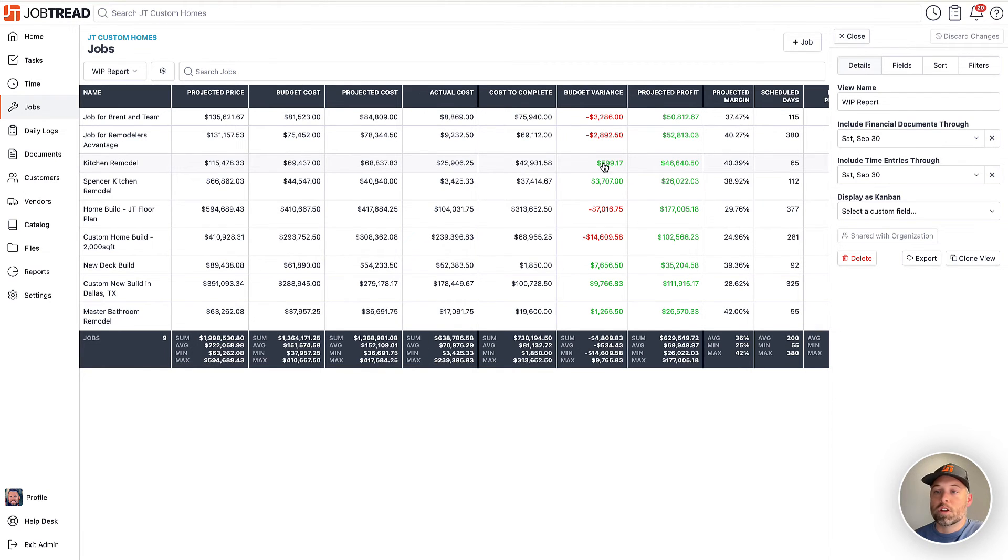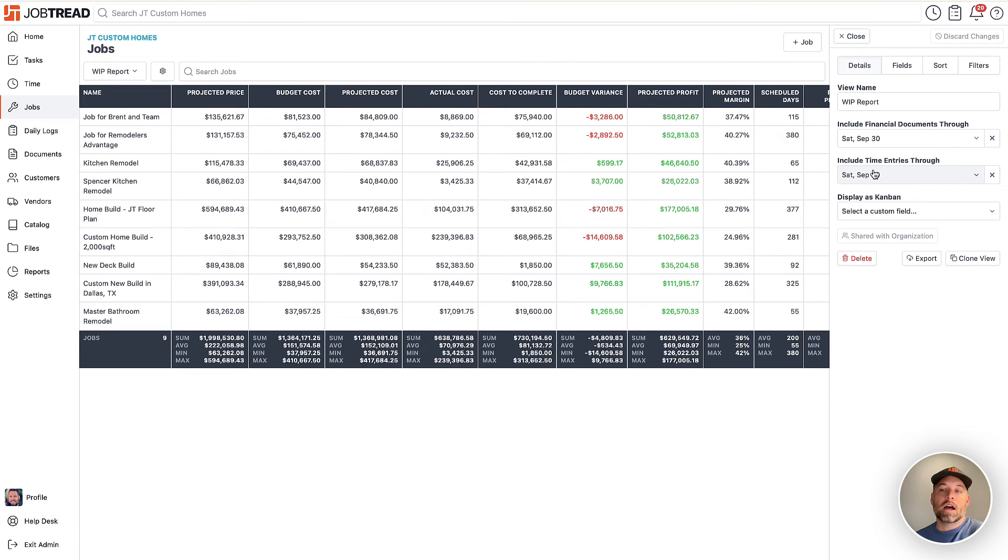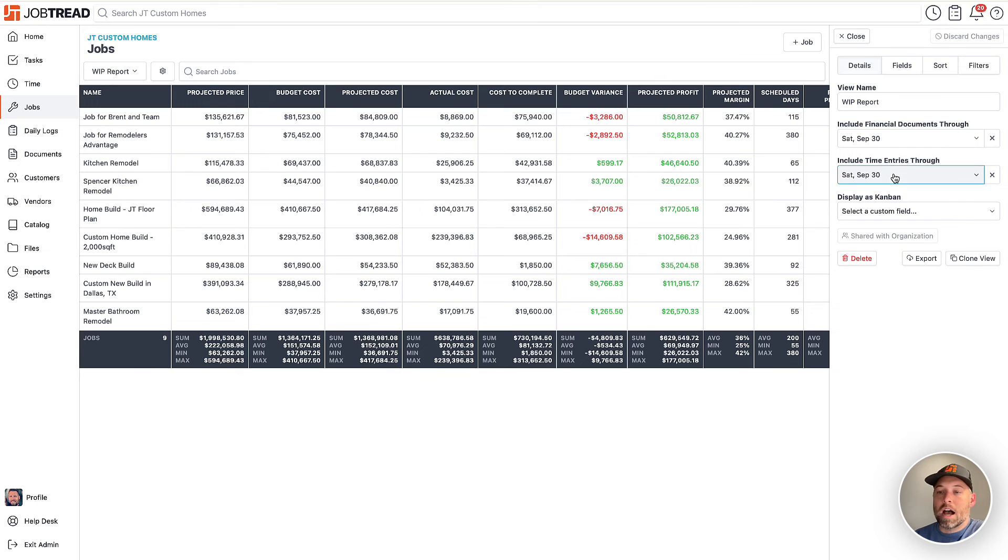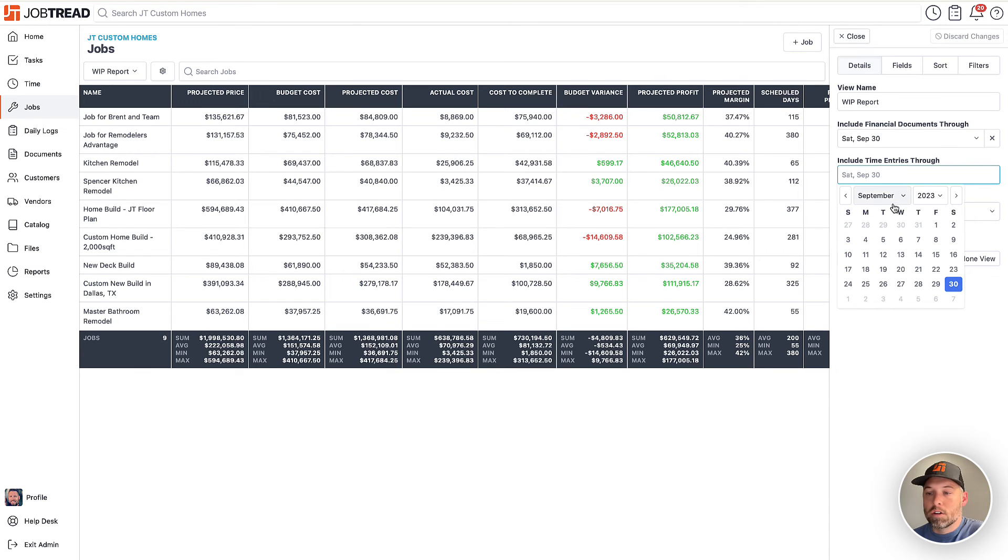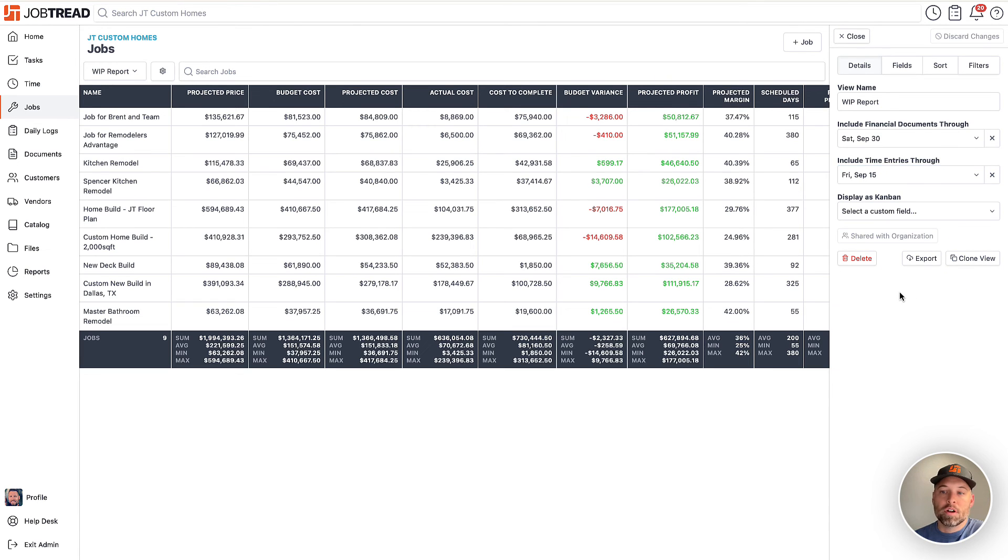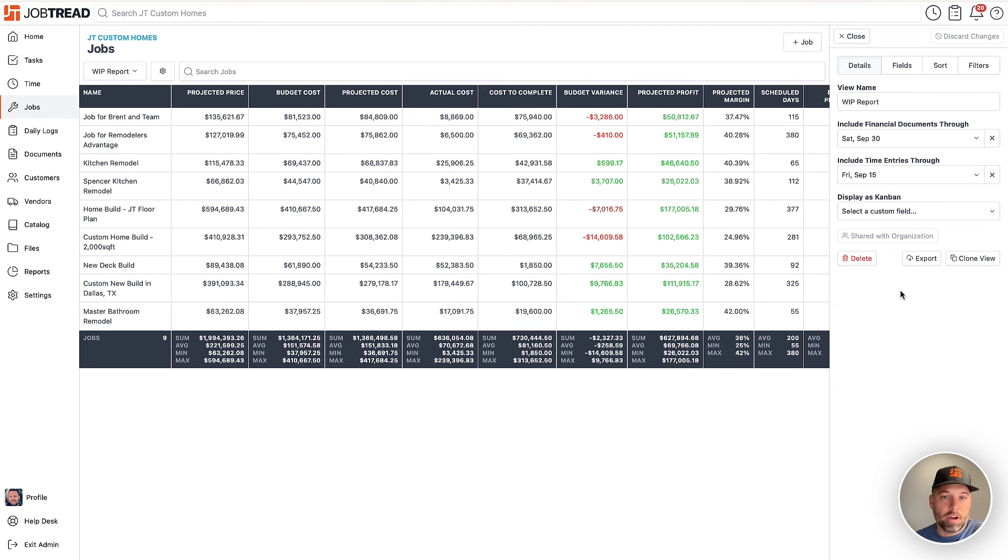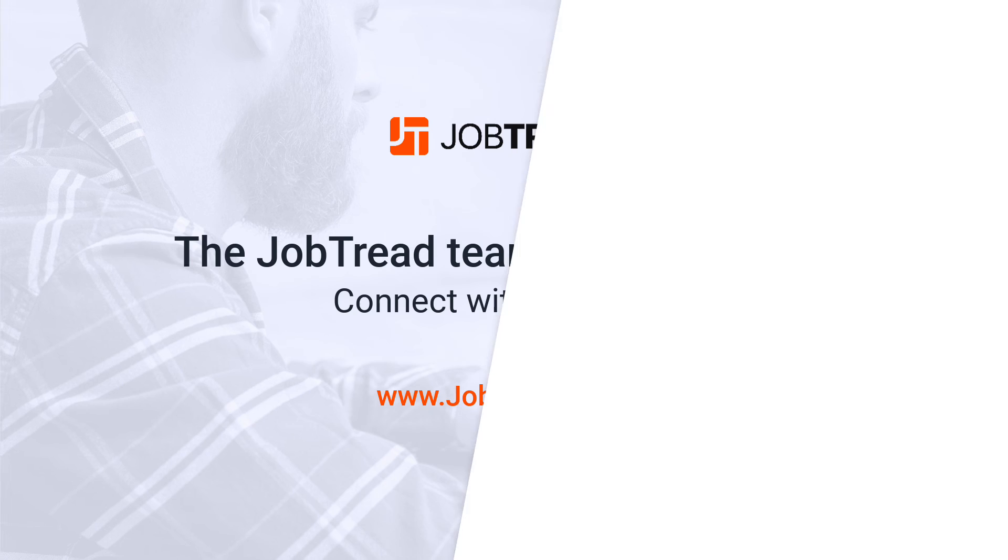You can also change the time entries. So if you're accruing time from the 16th through the 30th of September, you may not actually run payroll until the next month. So in this case, I could only include time, maybe, through the 15th of September. So those are two separate filters, one for the financial document, one for the time entries that allow you to get the numbers that you're looking for so you can generate an accurate WIP.